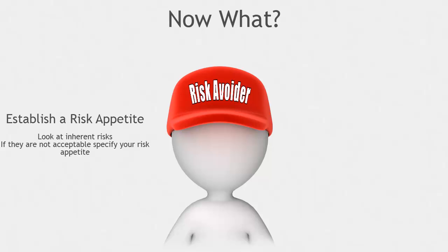So now you have to establish a risk appetite. Look at these inherent risks. If they are not acceptable, you must specify a risk appetite. That can be a simple qualitative statement that says something like the appetite for over budget and over schedule studies is low.